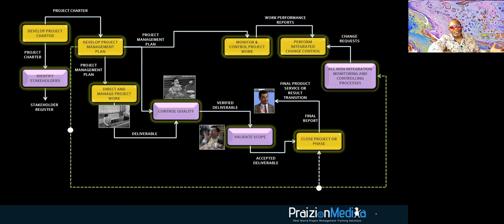We're behind. We cannot accommodate this. Or maybe it's, wow, we're so ahead of schedule. Well, let's go ahead and accommodate this change request. So work performance reports has relevance when you're reviewing change requests. See that? And this is how it all interweaves.